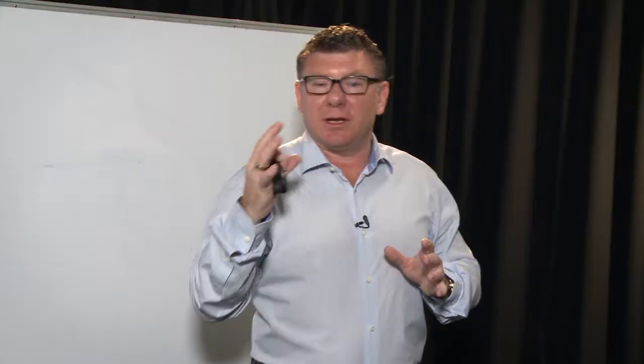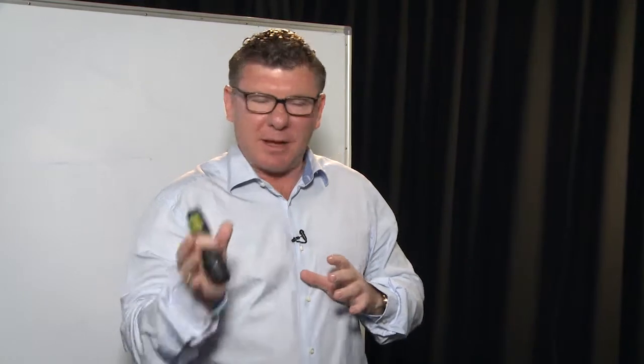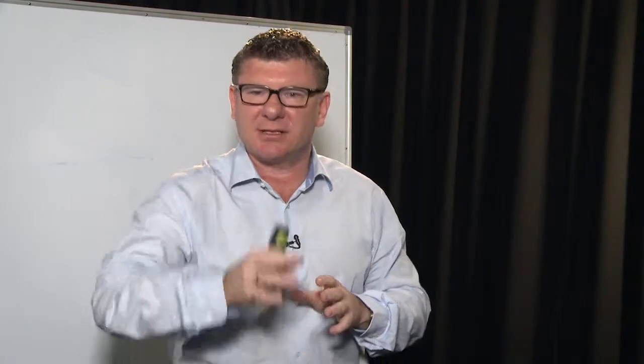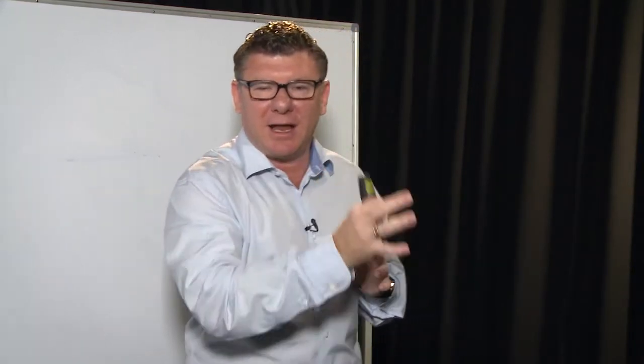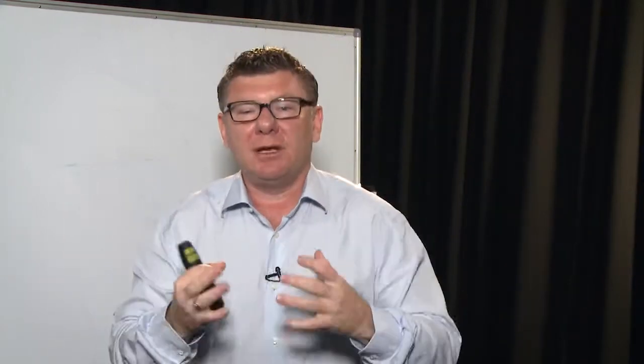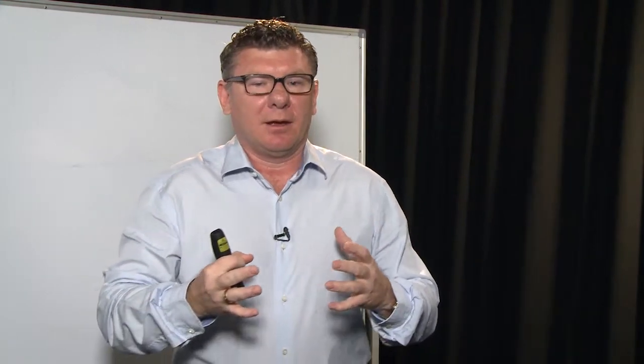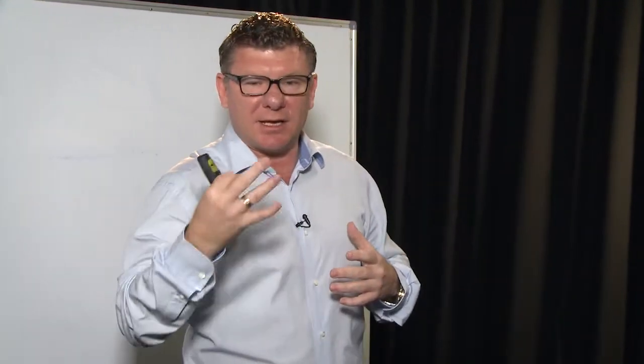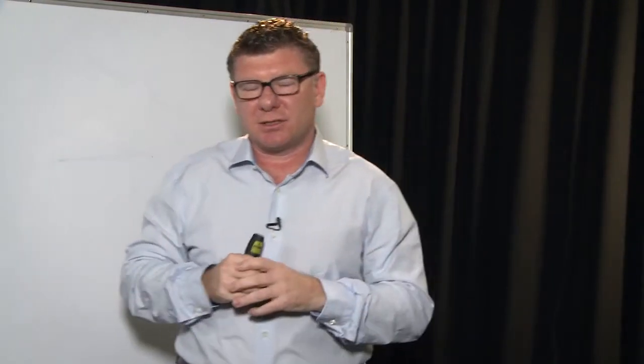Now, as we alluded to in session 1, it's about events. It's not about causes, it's not about consequences, it's about events. And if you cannot conduct a post-event analysis on a particular event or a particular risk that you have in your risk register, then there's no way that it should be in your risk register. We are dealing with events. Through post-event analysis, this assists us in understanding whether the risk that we have in our risk register is appropriate.